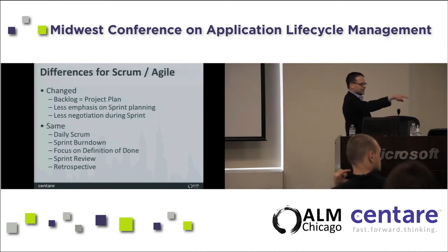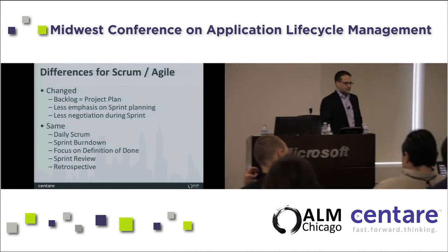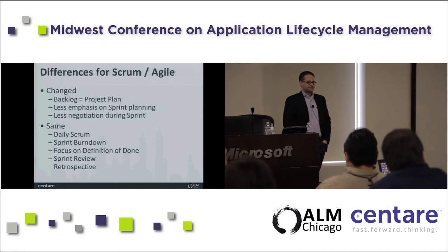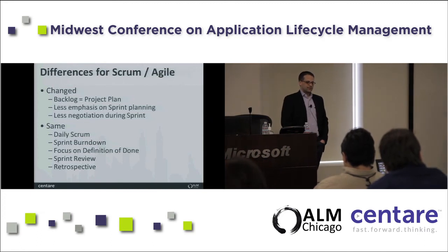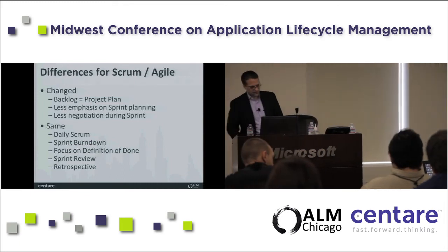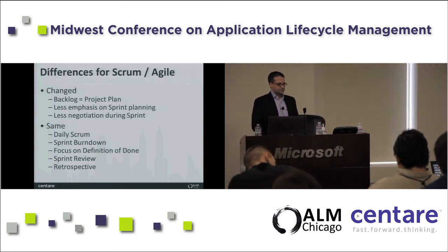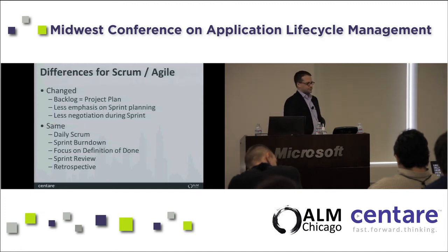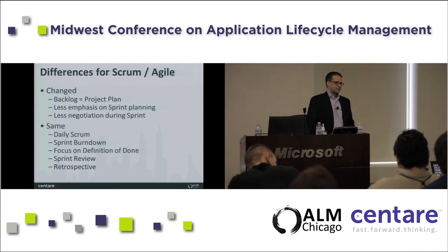Isn't it more towards managing risk? Because if your Scrum goal is purely to say, I'm going to deliver these 10 items which are not related, if any one of them doesn't get in, you fail. Whereas if you're measuring some overall goal of functionality, you can meet that goal on its date, and you may say, well, we missed 1 or 2 features. But in the end, your Scrum is successful. You measure something, you can deliver value.